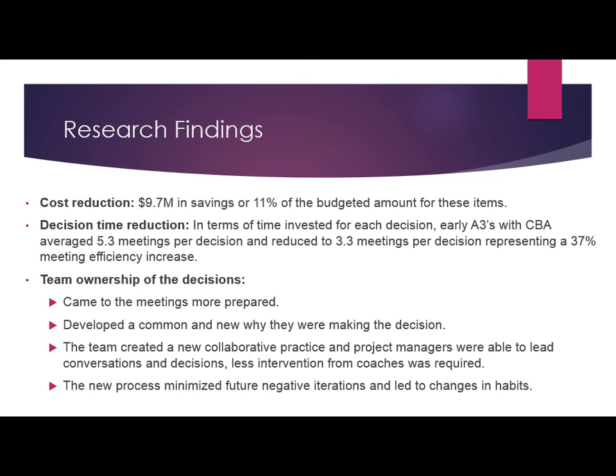The time to make decisions was also decreasing, so they started having fewer meetings per decision, and each meeting also took less time because they showed up more prepared. They had ownership of the decisions, so they came prepared and developed a common understanding of what decisions were coming and why they were making these decisions.